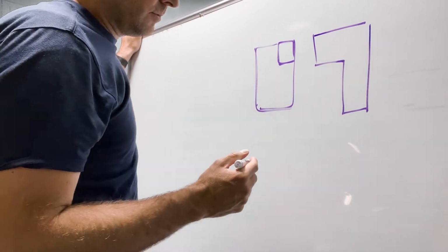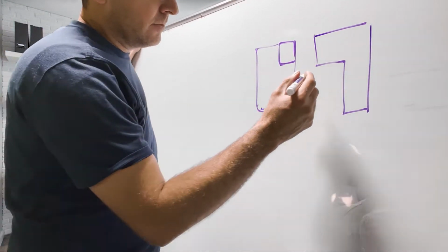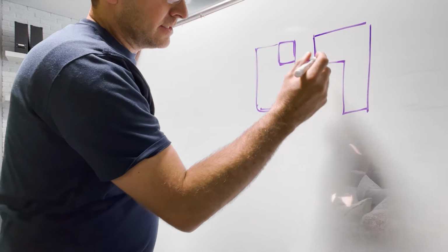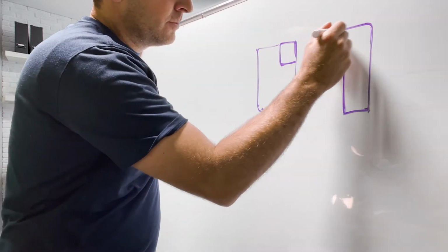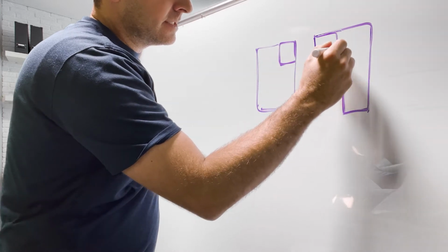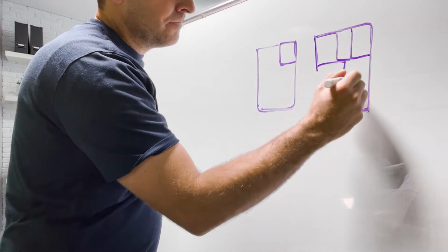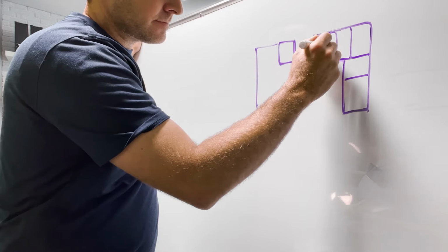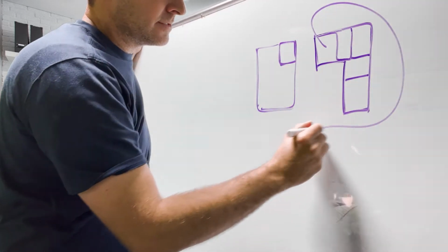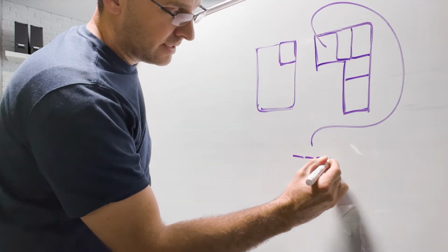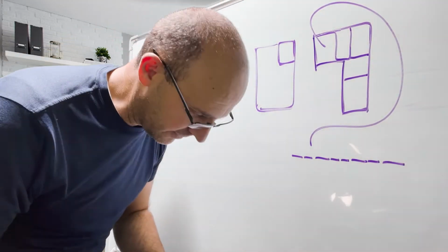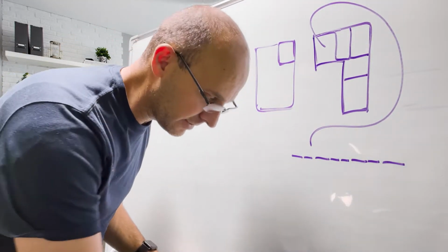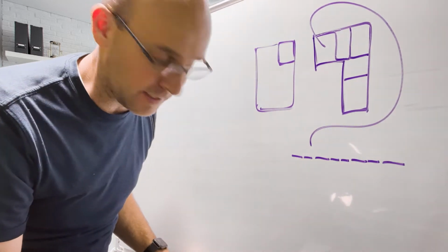So I do want to say one more time, well, let me do it like this. If you have your classrooms, and this is repetitive work, and you've broken down your areas into takt zones, and you have that broken out, when you create that takt zone and you've created that sequence of activities, that's essentially a pull plan.